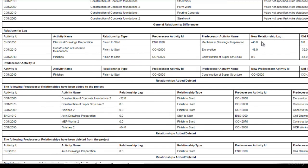Also, you can see what type of relationship changes I have made. For example, I have made a lag of 48 hours in my new project while in old project, there was no lag between these two activities.